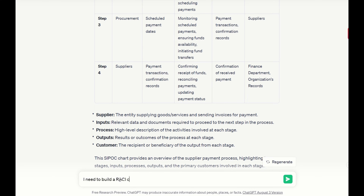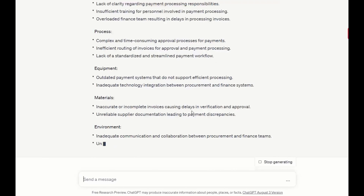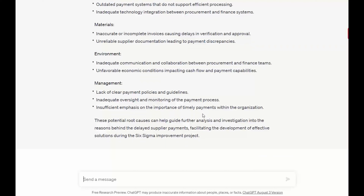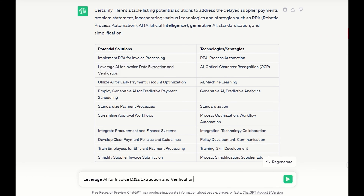Let me pick one of those ideas and build a specific problem related to it. The current payment to supplier takes on average 90 days from the time the invoice is received. This is affecting supplier relationships, causing loss of discounts and delays in future goods delivery, which impacts production. I asked ChatGPT to create a problem statement, and it created a very detailed one. Now I want to create a Six Sigma project business case and a project charter using the above problem statement. As you can see, I got a complete draft of the business case and charter.